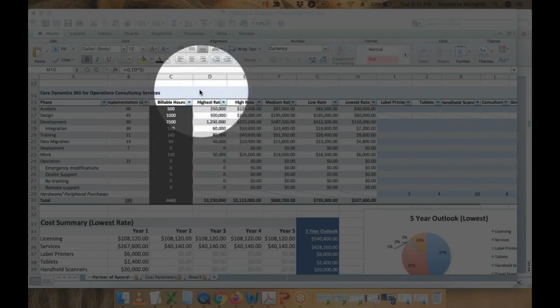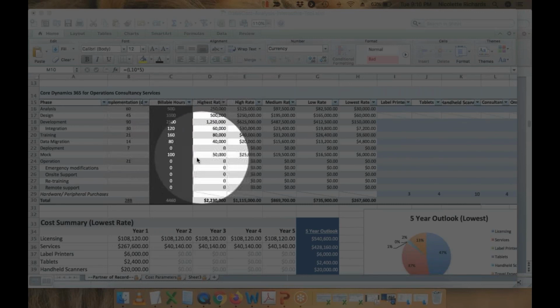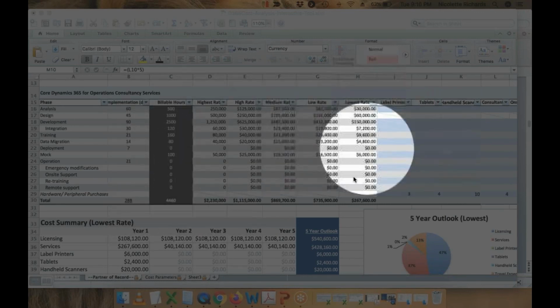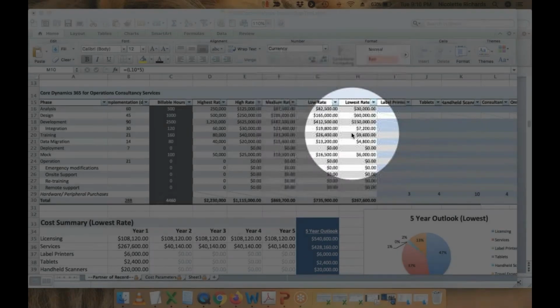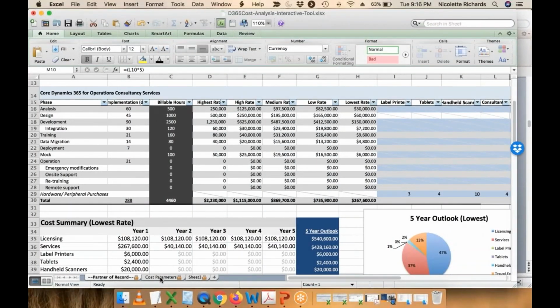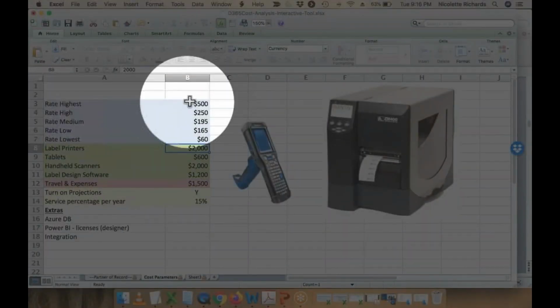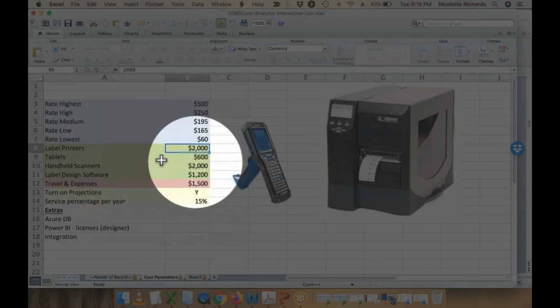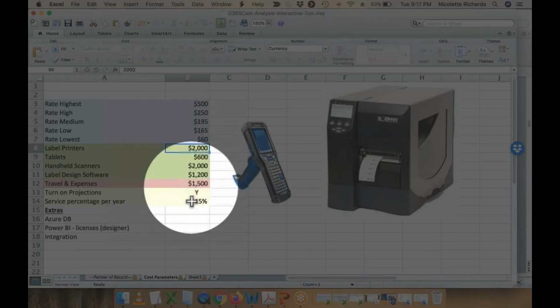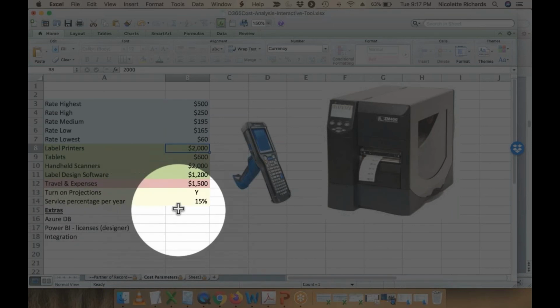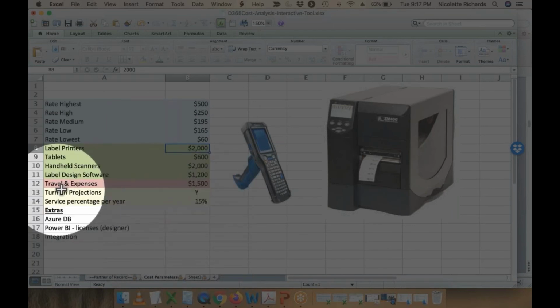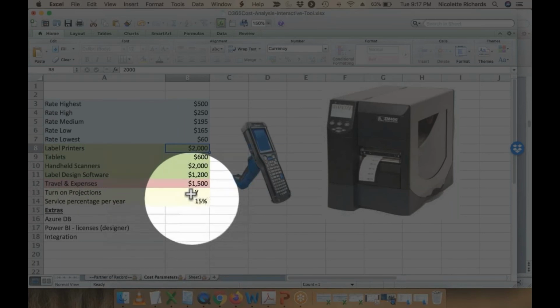Your project starts to balloon because there are certain decisions that are taking longer to make, and you're pulling in outside resources to help make some decisions for your business that you could potentially make without those outside resources. There are some activities that you can do internally before you invite the company over to consult, right? So this could be a factor of process maturity, not having certain things or decisions in place. This could be a factor of defining your clear goals and not trying to do too much, right?